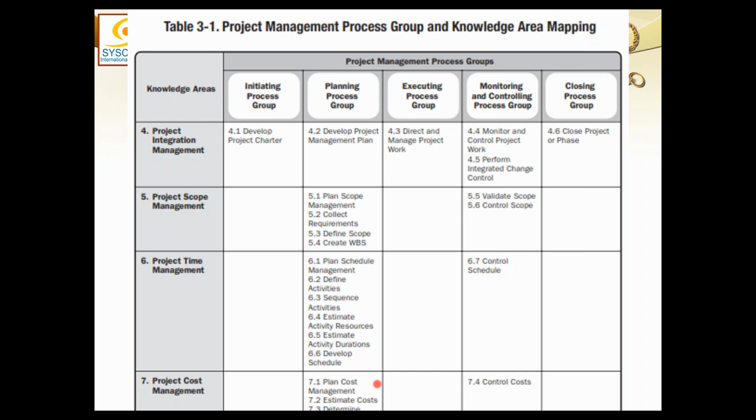Okay. First, you created a management plan for a knowledge area. Then, according to that management plan, you went through the remaining processes given in there. Like if I am talking about the scope management plan, you collect requirements, define scope, create the WBS, and do all these things exactly according to the instructions you have provided in the scope management plan. Once you have done all this, you would have a final version of the plan, the implementable version of the plan.